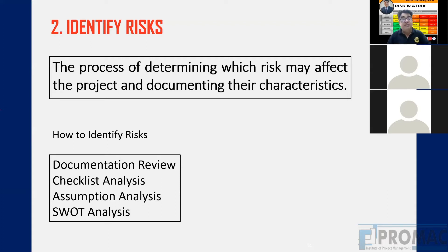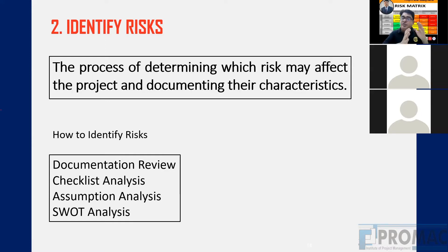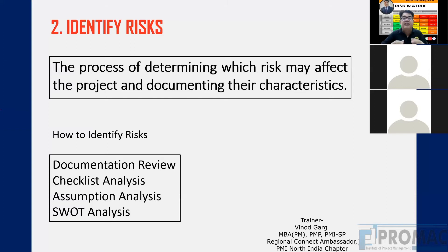There are four types of risk identification. Documentation review: reviewing documents and drawings — there may be discrepancies between structural and architectural drawings, between drawings and tender documents, or in the BOQ. Checklist analysis: based on previous projects we create a checklist covering quality, scope, schedule, drawings — noting where mistakes are normally found or things are missing that cause project impact. We do checklist analysis to find the risk list.